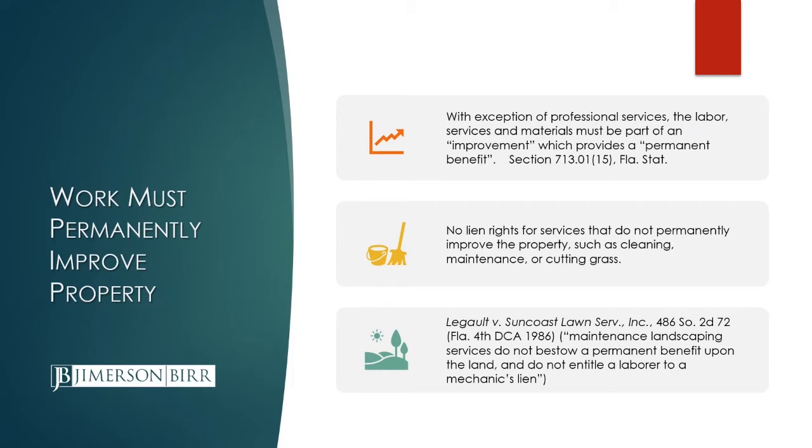There is an exception for cleanup. If it's the final cleanup to prepare a structure for occupancy, that is in the lien laws defined as a lienable item, but otherwise the daily cleanup is not going to be lienable. An example of a case talking about landscape maintenance is Legal versus Suncoast Lawn Service, cited there on the slide. The court there denied the lien claim and held that maintenance landscaping services do not bestow a permanent benefit upon the land and therefore do not entitle a laborer to a mechanics lien. So again, the lien law requires that the work be part of a permanent improvement, or provide a permanent benefit to the improvement.